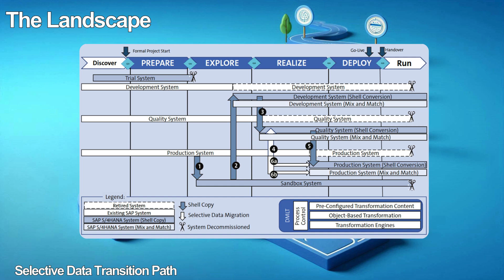Let's talk about the landscape. The discover phase starts with trial system access to review the innovations and fitment of current business requirements. The team then builds the sandbox environment by shell copying the existing production environment, using it to drive delta design workshops in the explore phase. Next, the sandbox is shell copied to the SAP S4 HANA development environment, where configuration work continues based on the product backlog. The project team then creates the QA environment by shell copying from the dev environment. In QA, the team completes all testing activities including selective data migrations, fixes bugs in the dev environment, and transports fixes to QA. After successful user acceptance testing (UAT), the team shell copies the solution from QA to the production system and performs the selective data migration from the existing production environment to the new production environment.